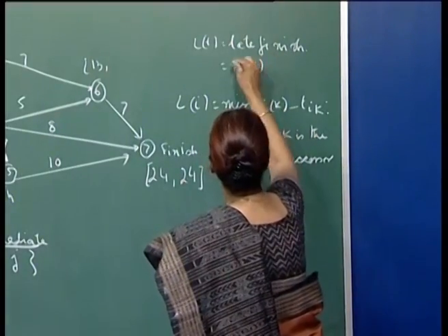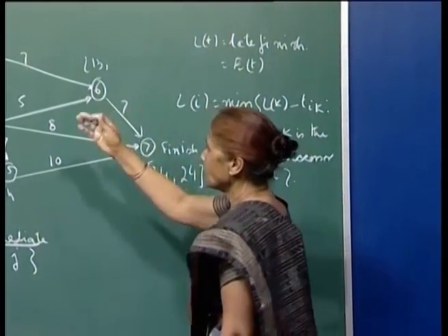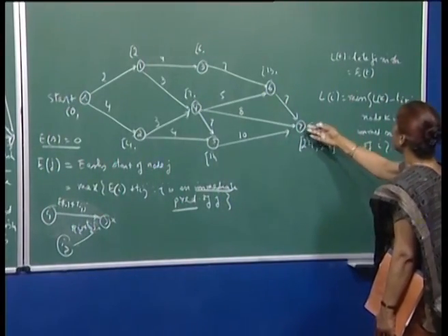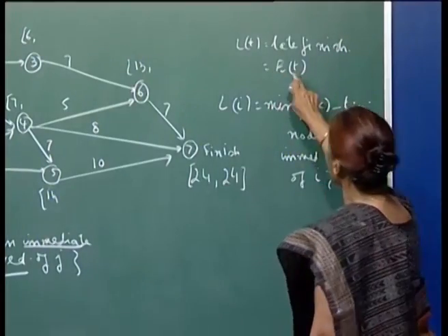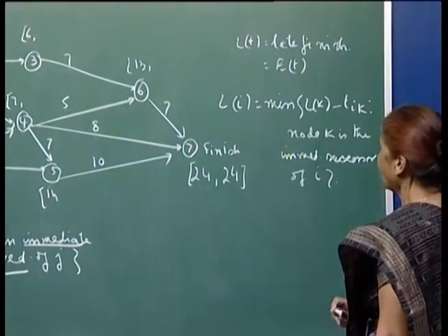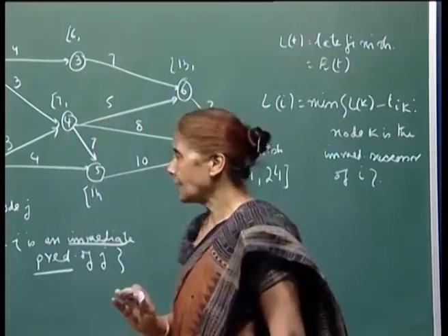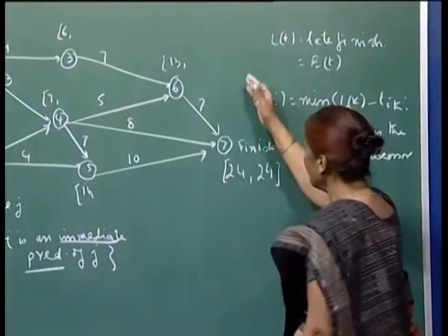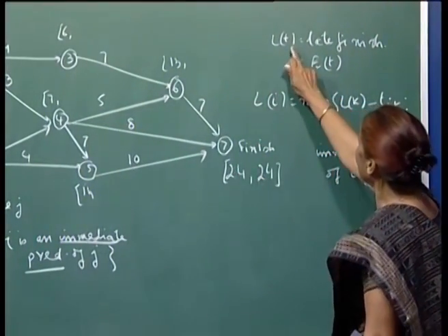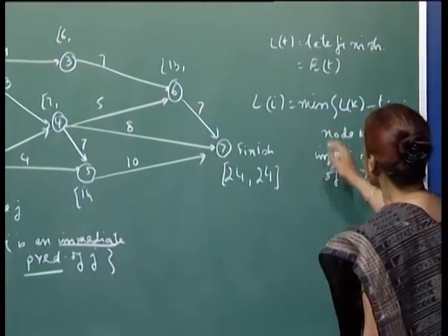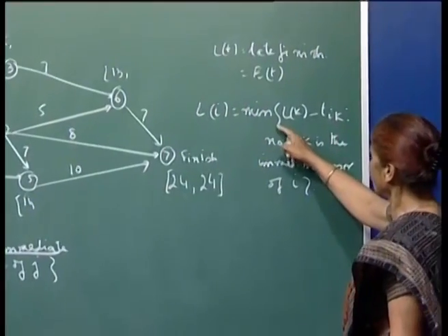Okay, I am using the node T, usually again the same concept, sink and source, so source and sink is used. I have written 7 here, but if you take the fact that a late finish is also the same as early finish, or sometimes what happens is there is a due date for the project. So, then the late finish can be taken as the due date of the project, and then you compute backwards, and the computation is again straightforward here.